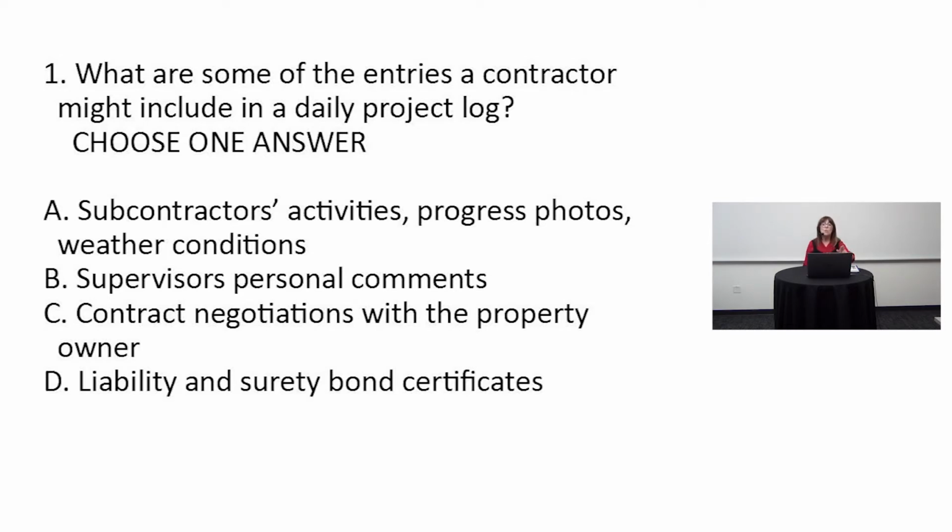Number 1, what are some of the entries a contractor might include in a daily project log? It's A, the subcontractor's activities, progress photos, and weather conditions. Make sure your progress photos are date stamped.